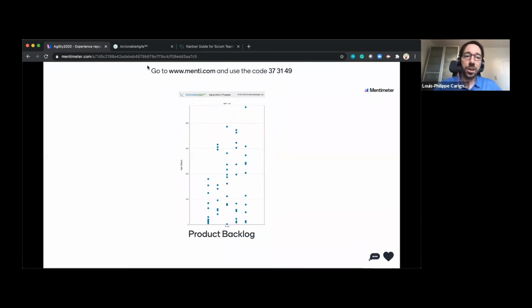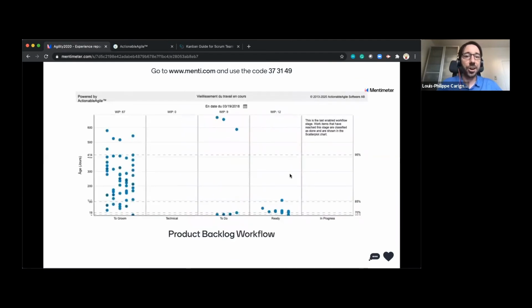If you've got some interest from your product owner, you might want to stretch your product backlog list and turn it into a product backlog workflow. So in this situation, I've worked with a team which went from one to-do column and decided to say, I've got a to-do room, which is just stuff, ideas that I've got pending. And when I know that I've got an idea that I want to work on, where there's some technical review on it, and then there's maybe some candidates on things that I want to do before throwing them into the sprint backlog, then people can start working on it.